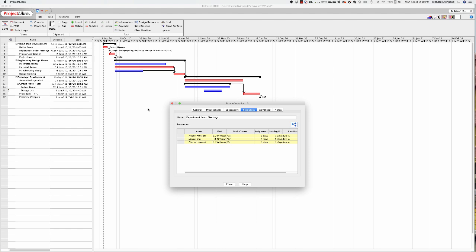And so the department team meetings are going to go off, and they're going to do these department team meetings. And when we said, well, we need 3 of them, so we assigned 300%, look what it did to our department team meeting task. Shortened it. So what happens is the system says, oh, you assign 3 people so they could do the work in less time. Not necessarily. So we run into a little problem here.